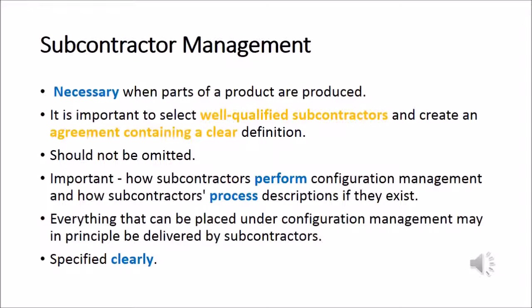Everything that can be placed under configuration management may in principle be delivered by a subcontractor. When a company defines what must be placed under configuration management, it should take into consideration what is delivered by the subcontractor and how configuration management is performed by the subcontractor internally. It should be specified clearly to the subcontractor which objects must be placed under configuration management and when, and the degree of formalism required.